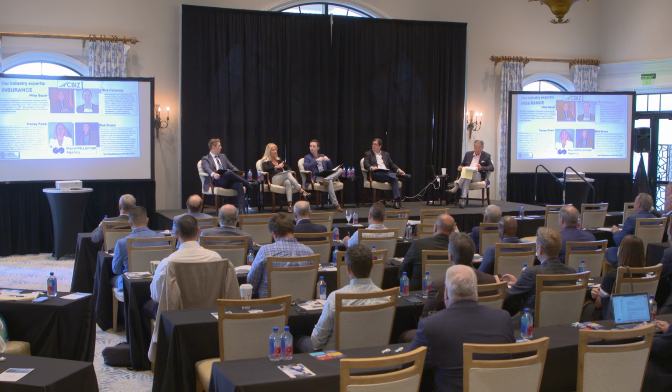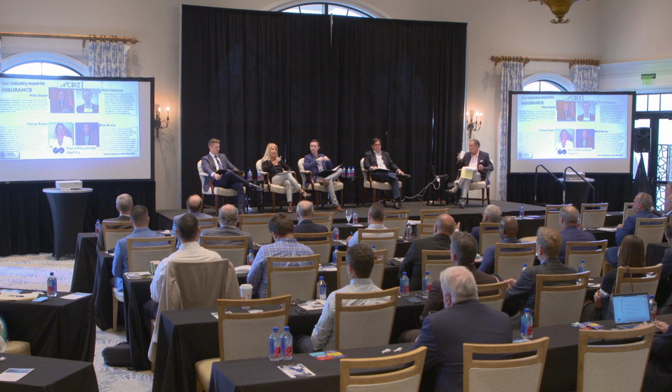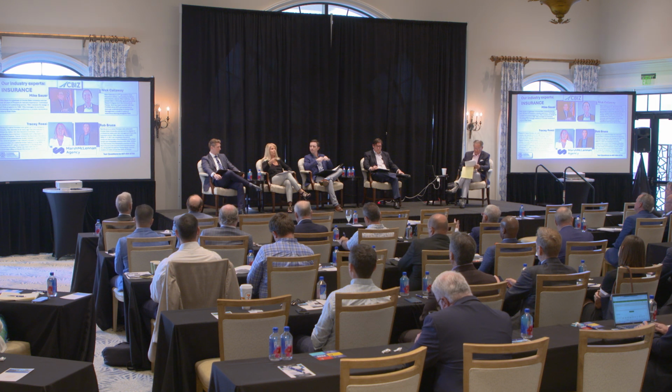The one thing I want to say about this is, because I know we always talk about the property, right, which is super important, of course, but nowadays the majority of general liability policies have some sort of construction exclusion or minimal piece to it. So it'll be construction with a give back for maintenance, or construction is okay under your $1 million GL, but your umbrella carrier might have a limitation on construction.